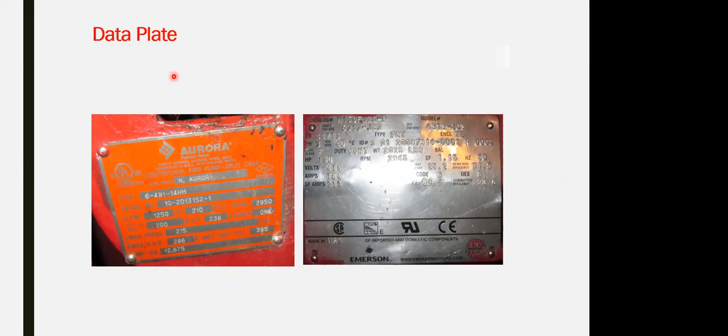In DC2, you have to submit a full design calculation for the fire pump itself, taking the calculation as design parameters from the design IFC drawing. After getting the approval for DC2, you have to place the order and get the material submitted from the manufacturer. At the as-built stage, you have to compile all the calculations from the manufacturer for the head calculation, the GPM, the selection of the pump itself, and the characteristic curve.